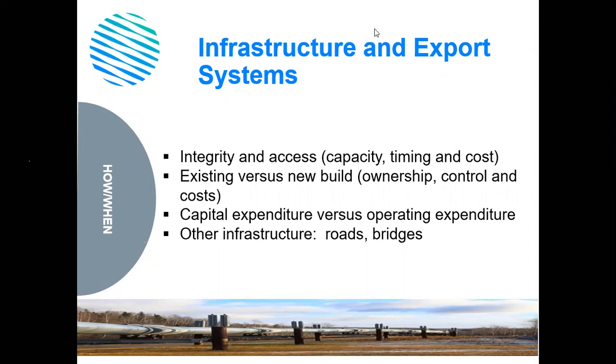And the point on other infrastructure like roads and bridges is quite a simple one. Basically, just don't forget them. If the project will require new roads or bridges, the cost could be considerable. So if cost isn't factored into your modelling, your project valuation will be overstated.